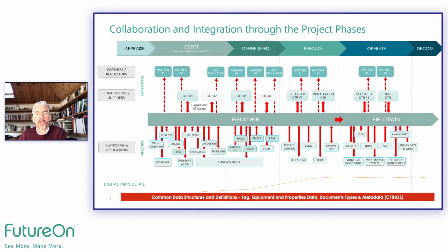Any break in this central digital thread can result in a significant amount of work as a handover is then required as the project moves through each different phase. In particular, the handover of the digital twin from the project team during execution to operations can be a huge task to manage, and it can be difficult to maintain data quality.